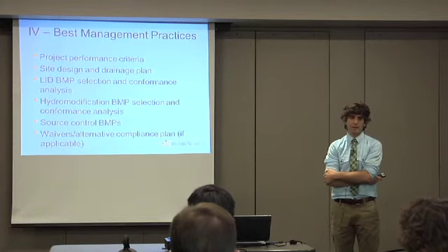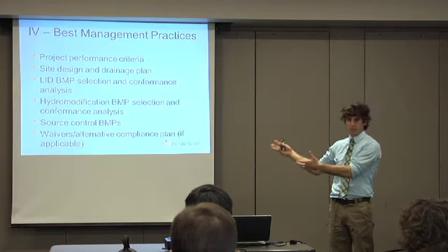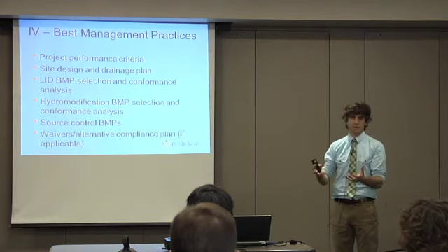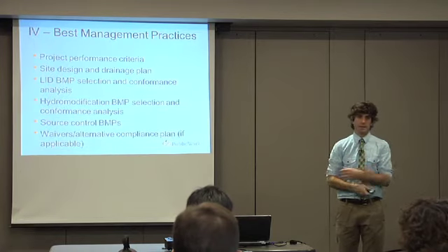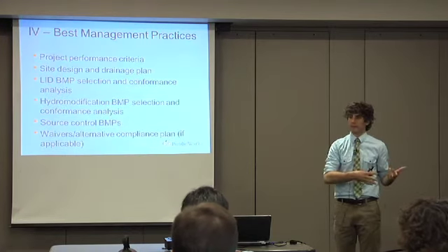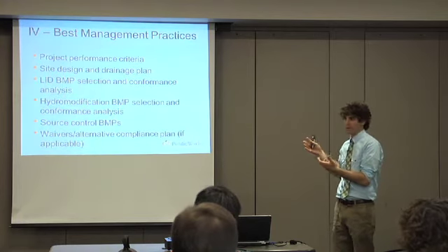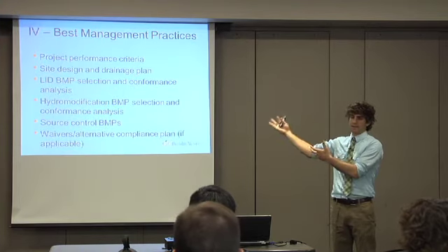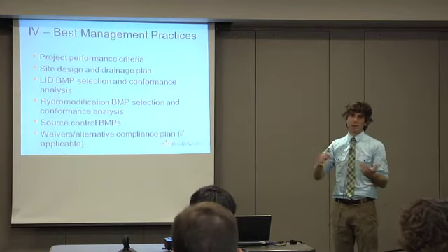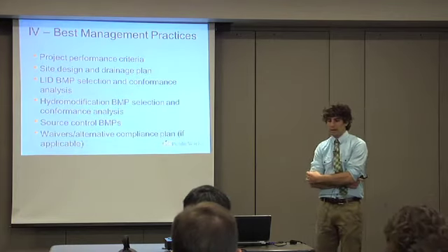Their conformance for LID may be just saying, look, HMP controlled this design. The resulting design infiltrates the amount of water that exceeds the LID DCV. Therefore, that's compliance. We don't need to go through all the LID BMP worksheets to do LID BMP sizing. We already have a sizing standard that controls. The same BMP also meets LID criteria. So that's an example of how that might look.